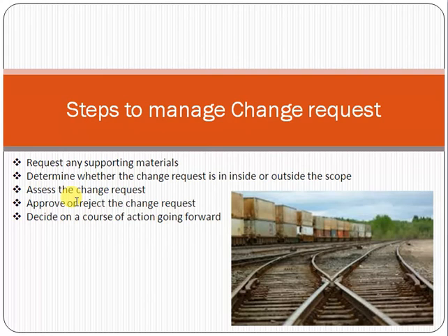If the change request is not approved, you should analyze why these changes are coming, but overall there will be no impact on the project. It will go on as it is. If it is approved, you have to change the project plan, the project schedule, and the baselines, add the cost, and add the days in the project schedule. So all these impacts will occur if a change request is approved, and also the scope of the change request will become a part of the project.